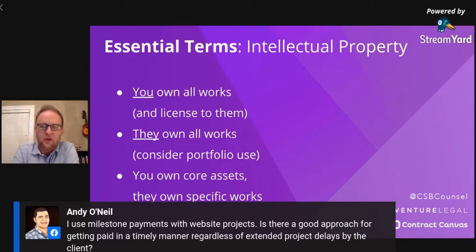I mean, the best way to do this is outline payment based on date. And sometimes your client may not like that, and sometimes you may not even like that. But the best way to do it is to place estimated timeframes for when you're going to be doing the work. So going back to my easy example again, a $5,000 project, let's just say you think it's going to take you 5 weeks. I would say that your contract should just say that $1,000 is due on every Monday or every Friday or whatever it might be. And then you would also have in that contract something that I had mentioned earlier on the services slide that says that you're not responsible for their unreasonable delay in responding to your requests.